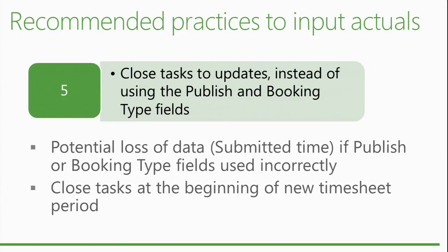Yes, yeah. But if you allow them to use the timesheet, for example, then I would use single entry mode because then you have everything in one screen. You have the assignments and you have the non-project time with all these categories that you define, and the users have only one page to input, and they will always like that better than having two screens to deal with, and the import and everything. It's a little bit more complicated to do.